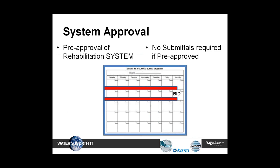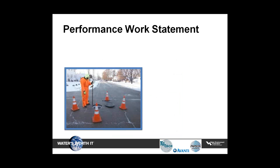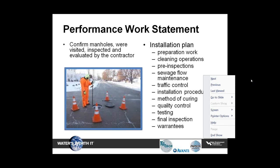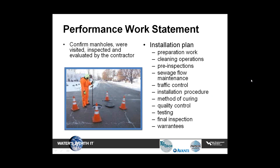One of the items in the specification is that the system manufacturer must submit to the owner, a minimum of 14 calendar days in advance of the bid date, all required product information to obtain pre-approval system status. The contractor shall submit a performance work statement at the pre-construction meeting. At a minimum, it shall contain: certification that designated manholes were visited, inspected, and evaluated by the contractor; a detailed installation plan describing all preparation work, cleaning operations, pre-inspections, bypass pumping, traffic control, installation procedures, method of curing, quality control, testing to be performed, final inspection, and warranties; a detailed installation schedule; and the contractor's experience for each type of rehabilitation component.